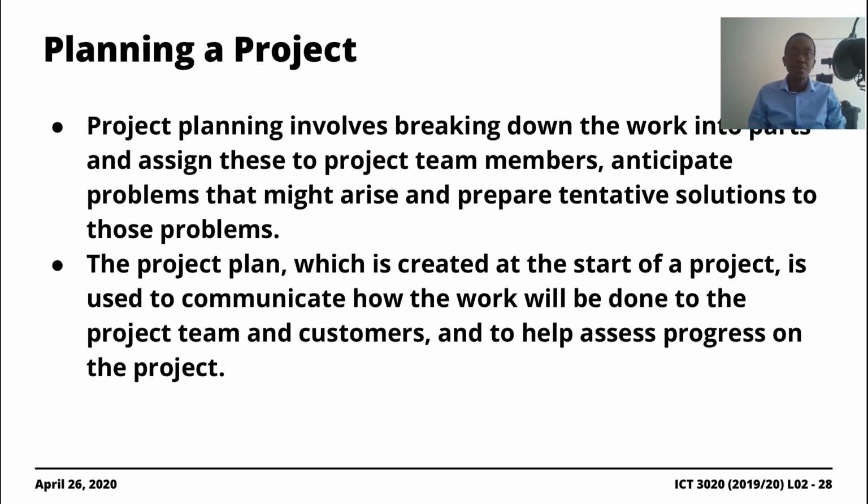So this whole notion or idea of project planning essentially involves breaking down the work activities associated with the project into their constituent parts or units, right? And if you remember in the previous unit, we introduced this whole notion of breaking up a project into activities and then subsequently into tasks, right? A task will essentially be a work unit, the smallest possible work unit that can be associated with your project.